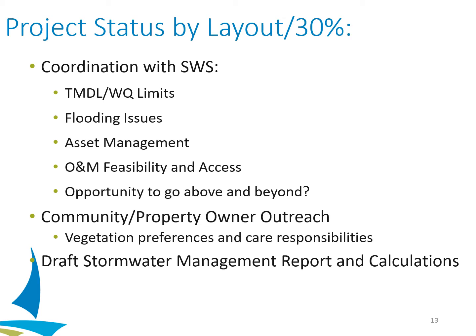Additionally, we should have already started coordination with Surface Water and Sewer to understand if there are any other issues like flooding or TMDLs to consider in our designs, and any asset management work being done. Importantly, we need to understand our O&M feasibility, considering things like access, equipment, and the ability to maintain the proposed treatment. We also want to start understanding if there's an opportunity to go above and beyond on a project — if the project is located somewhere with extra space or highly infiltrating soils, we'll want to know that as soon as possible.